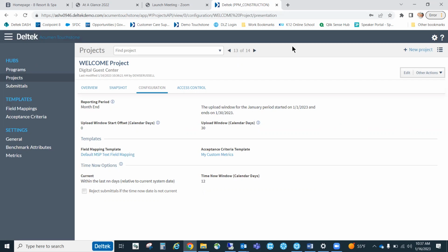So when I come in Monday, if it got accepted, I know it's at least a minimum quality that I might feel comfortable loading into my integrated master schedule, because I don't want to load something that's going to blow up my file, and then have to hunt down everything that went wrong. If I can completely remove myself from that initial process and make sure I have some minimal level of quality, that's more time back for me to do schedule analysis, rather than babysitting a subcontractor submittal.